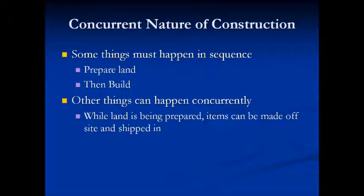Some things have to happen in sequence. You have to prepare the land and then you have to start building. Other things that can happen concurrently include: while the land is being prepared, items can be made off-site and shipped in. Depending on how skilled the general contractor is, fabrication can be occurring while the foundation is being laid. So in looking at the process of how to construct a building, it's important to keep in mind this idea of the concurrent nature of construction.